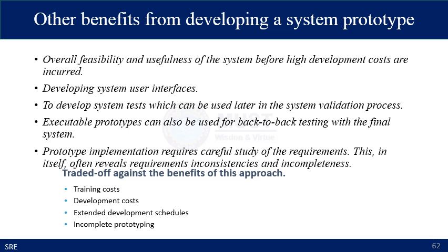Prototype implementation requires careful study of the requirements. This in itself often reveals requirement inconsistencies and incompleteness. However, there are certain trade-offs against the benefits of using prototypes. Usually, there are training costs required to teach the users to use the prototypes, and there are development costs involved in the prototype development, and extended development schedules due to the development of prototypes, and prototypes may represent an incomplete system overview.